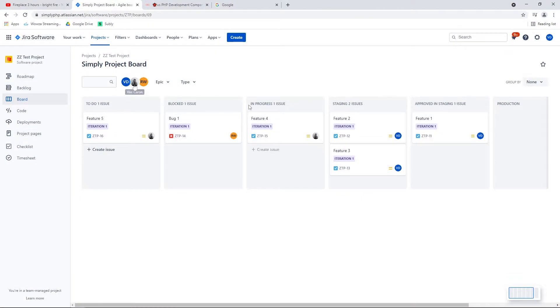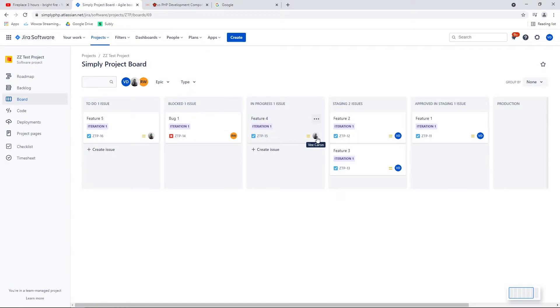In progress — pretty self-explanatory. So when you are the only developer working on a project, you shouldn't have more than one ticket in progress. And that's also another instance where you would be in progress on a feature but you become blocked because you have to work on something else. So you would take that ticket and move it back over to blocked. These cards are really easy to navigate between all of these statuses.